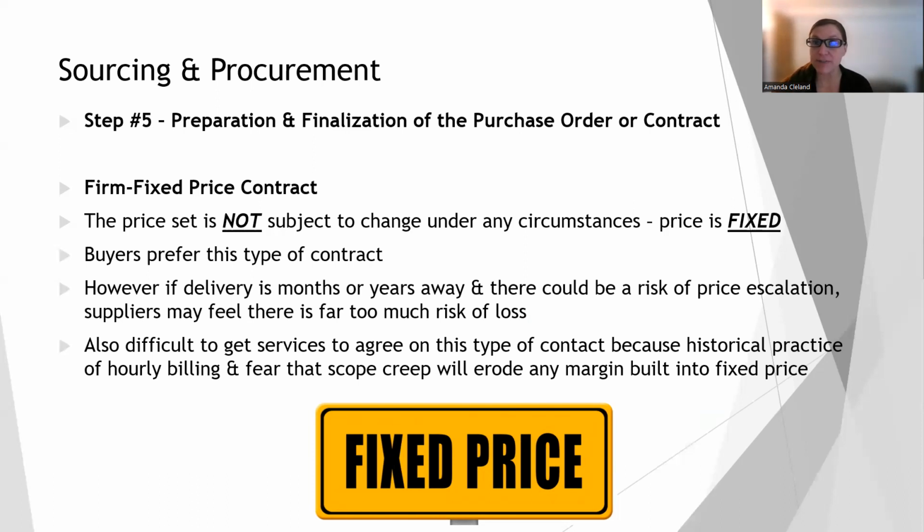It's also very difficult to get any types of services, any kind of intangible services that isn't a tangible product, to agree to firm fixed price contracts because of the historical practice of hourly billing.